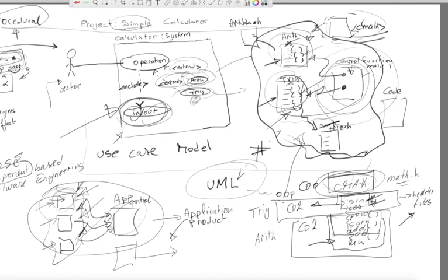ranking, numbering, whatever you want to call it, depending on their level of difficulty or the time they take to produce. The reason I'm going to give CO1 a lower value is that a lower value means it's easier to handle versus one that has a higher value, if you want to use an integer to give weight to the level of difficulty.